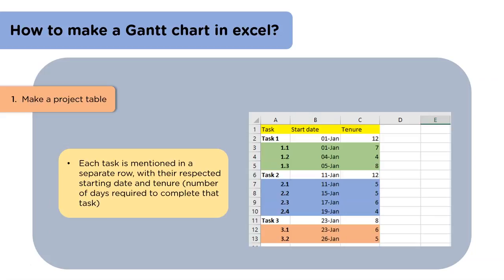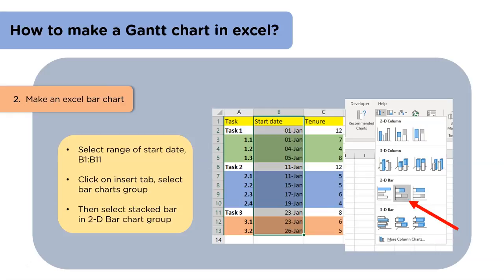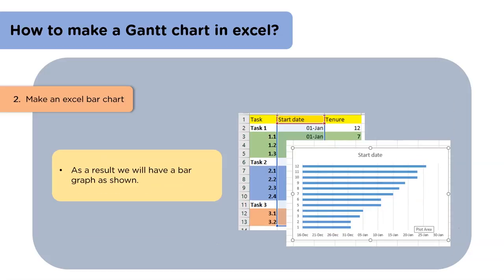The first step is to make a project table. We have several rows and columns — here we have three columns. In the first column we have the tasks, in the second we have our start date, and in the third column we have the duration or tenure of the task. The second step is to make a bar chart in Excel. For this, we will select the entire second column, then go to the insert tab and click on the bar graph chart. There we can select the stacked bar graph in 2D bar charts. As a result, we will have the bar graph on the screen.